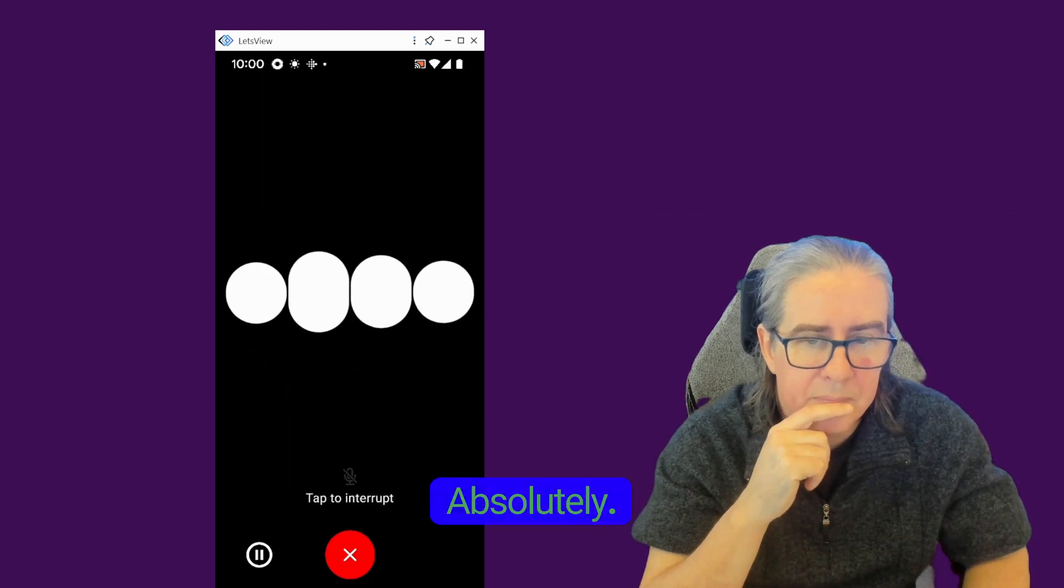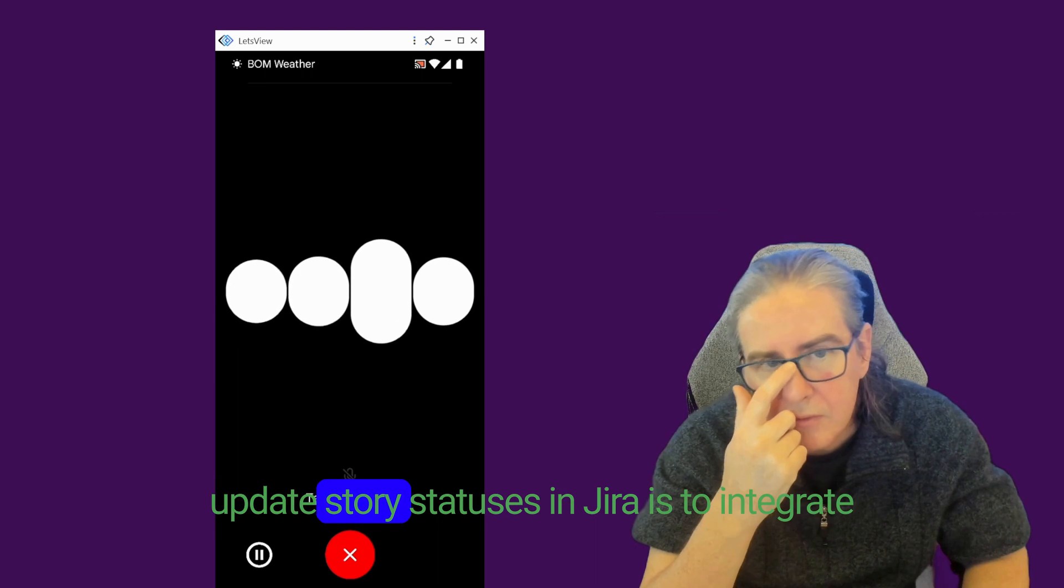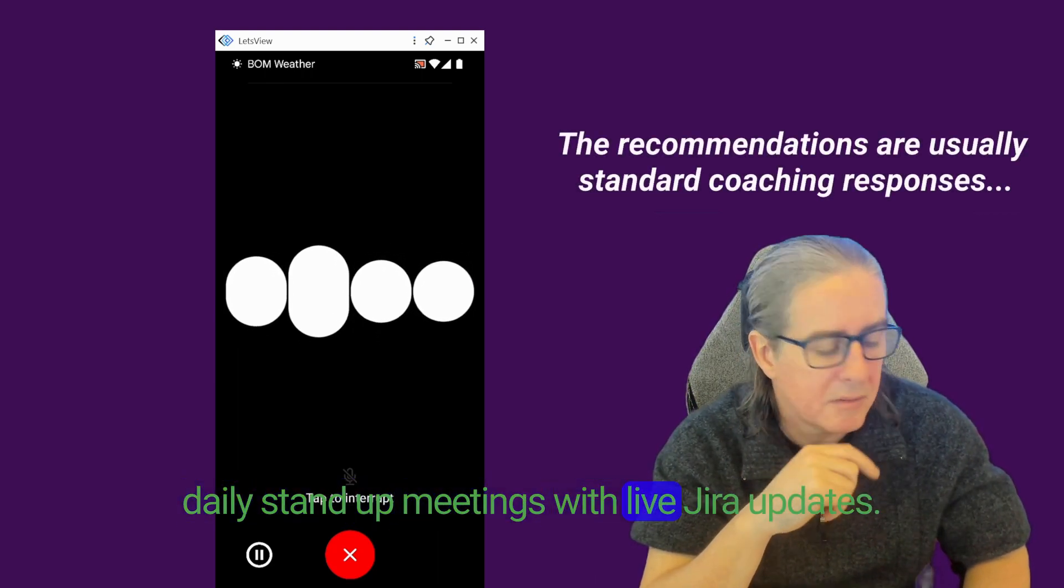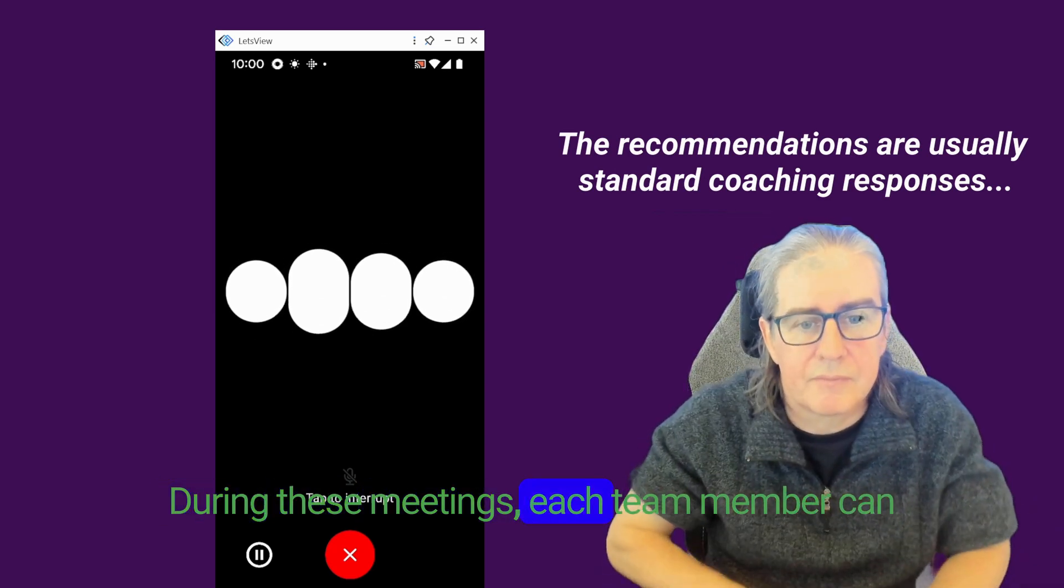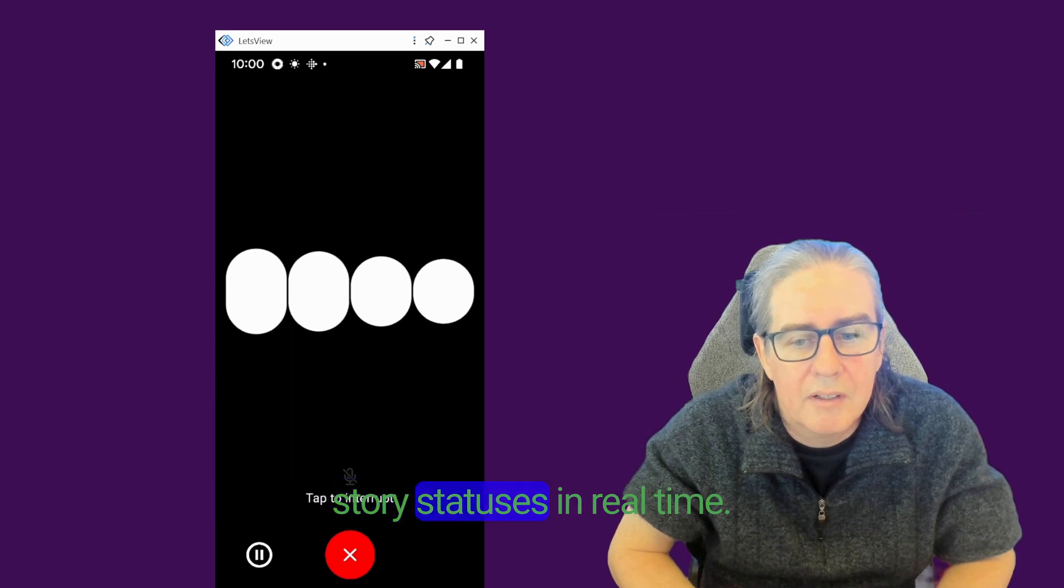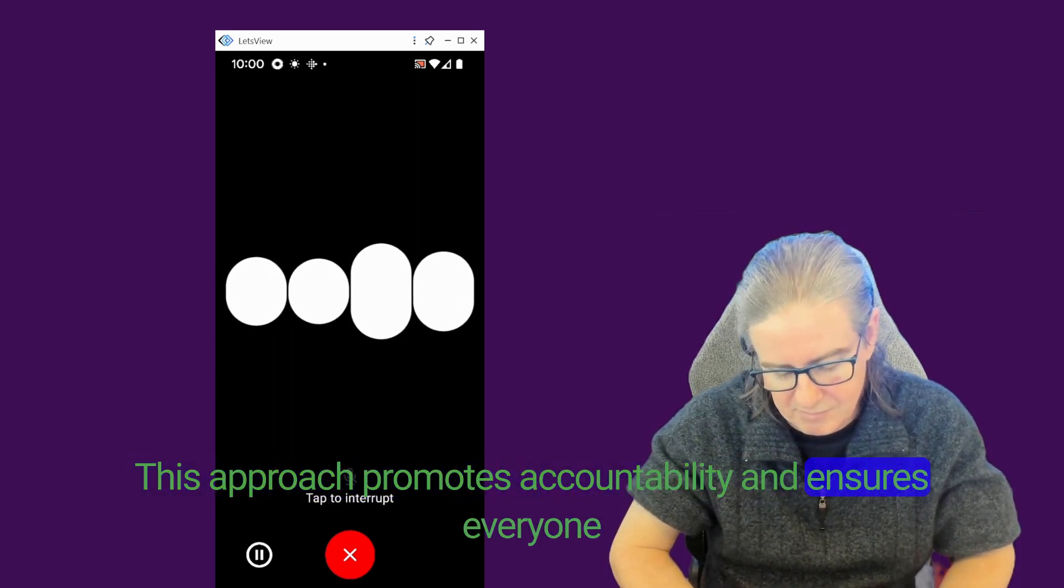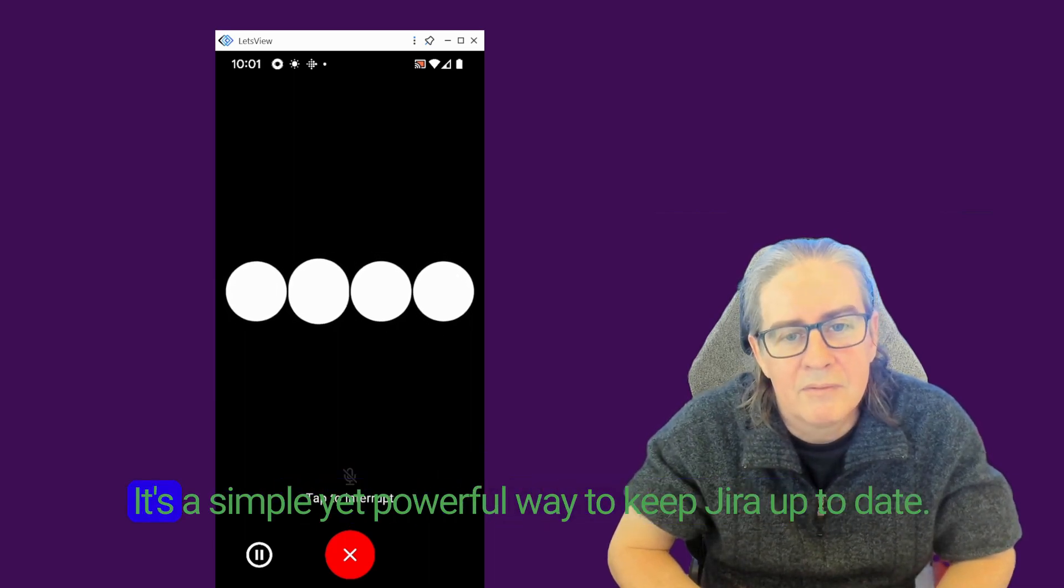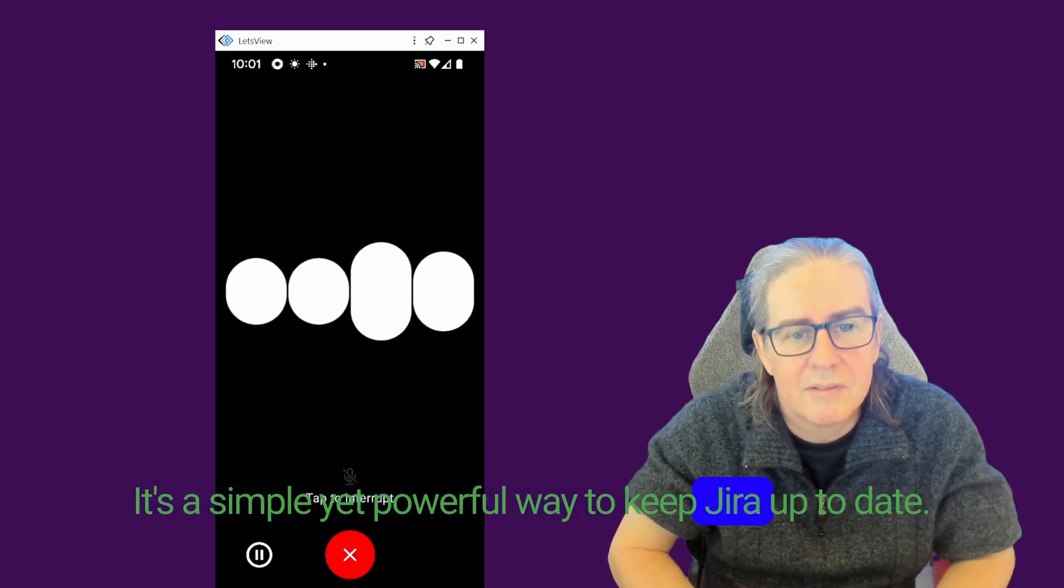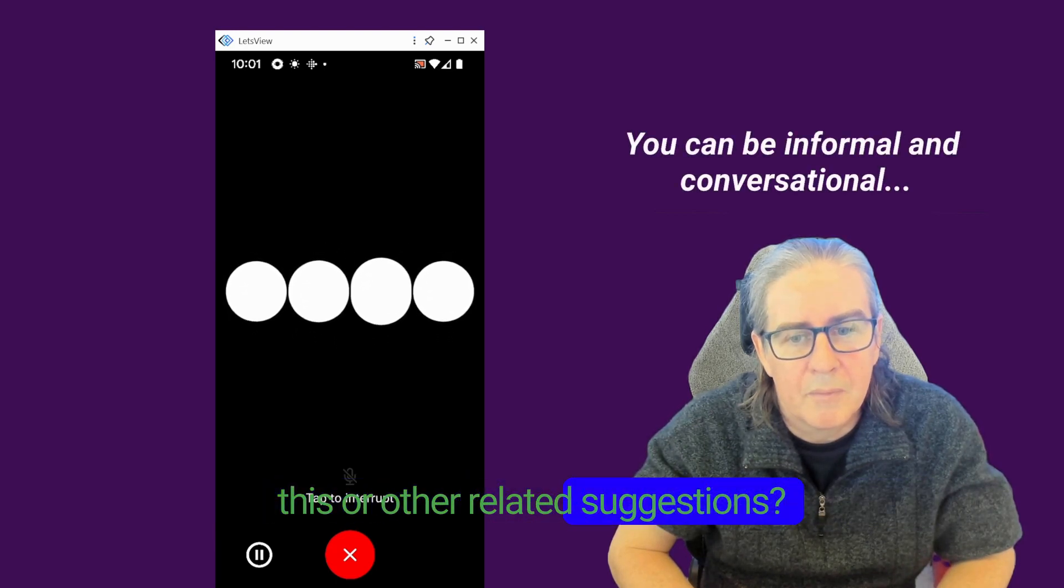Absolutely. One effective way to encourage your team to update story statuses in Jira is to integrate daily standup meetings with live Jira updates. During these meetings, each team member can briefly discuss their tasks and update their story statuses in real time. This approach promotes accountability and ensures everyone is aware of the project's progress. It's a simple yet powerful way to keep Jira up to date. Would you like more details on this or other related suggestions?